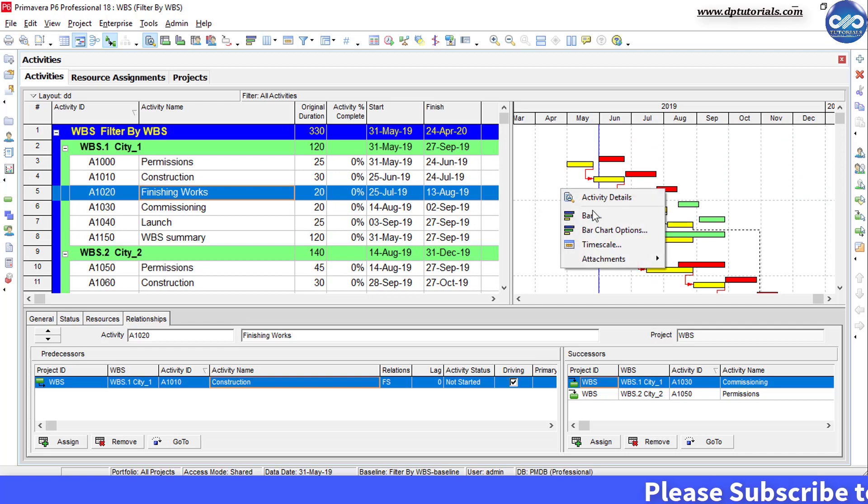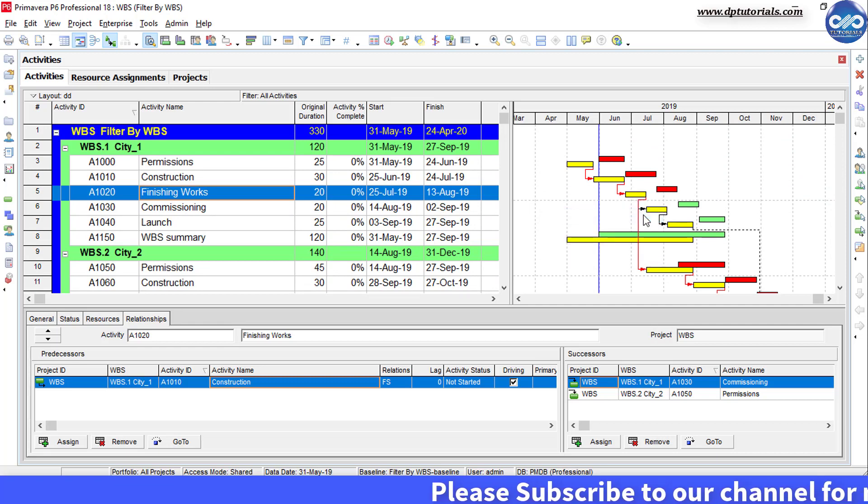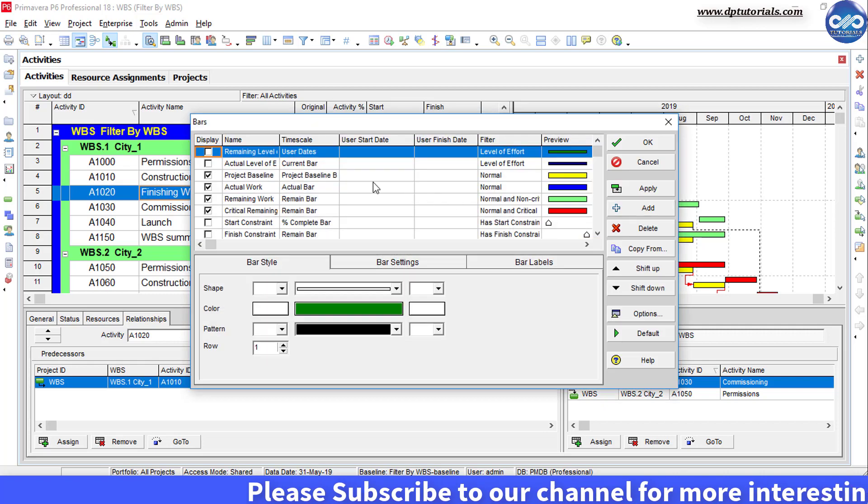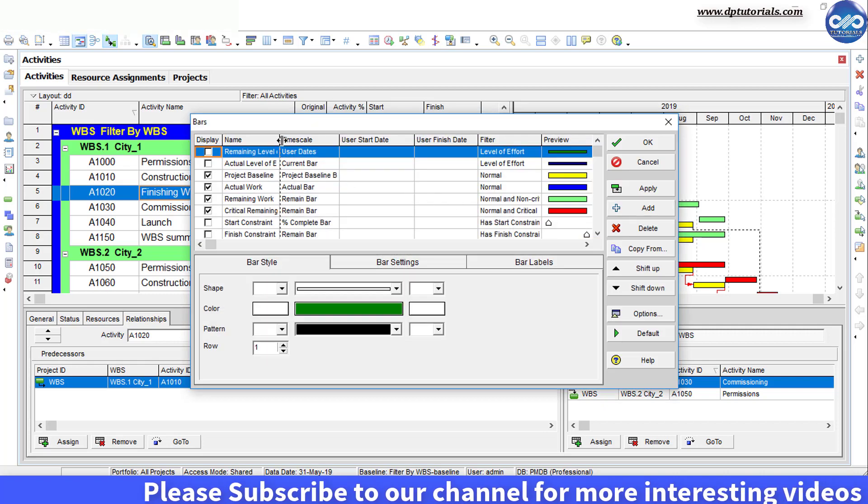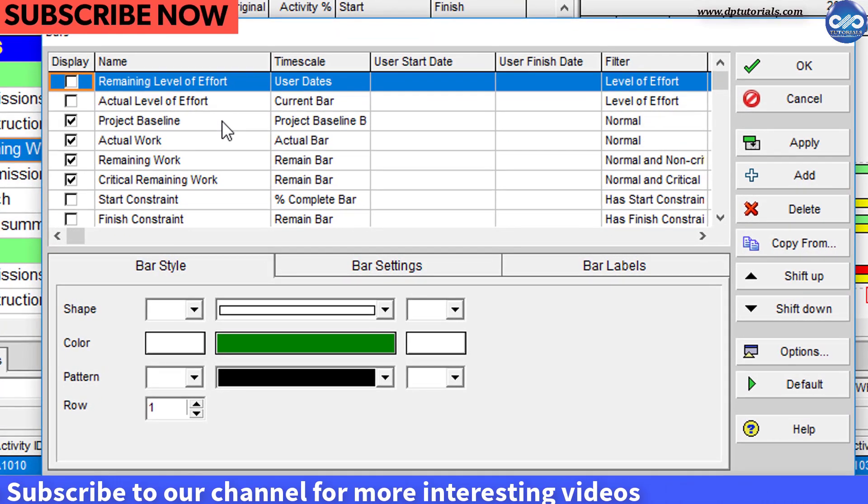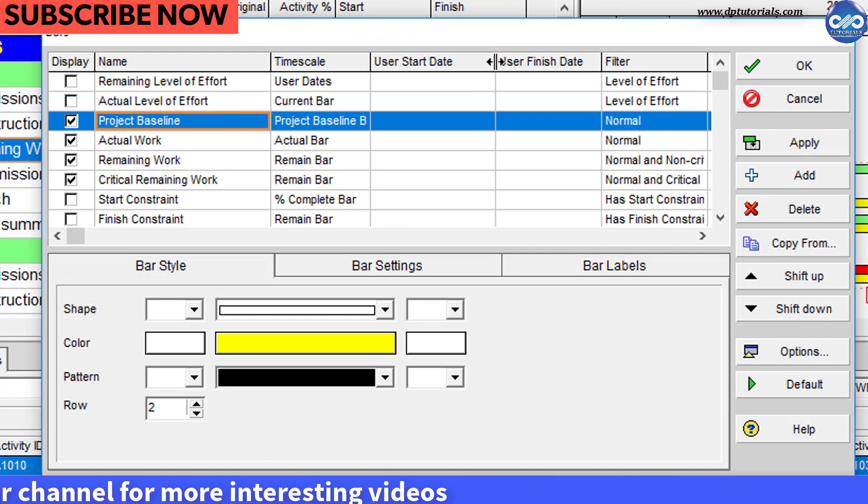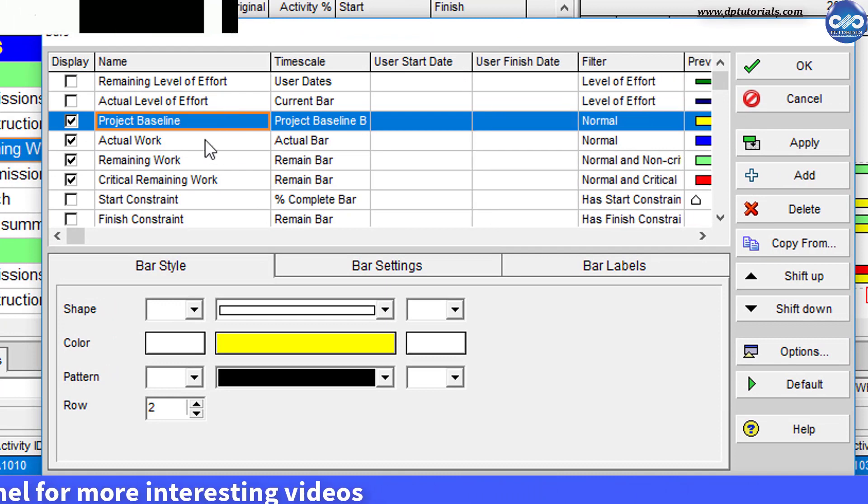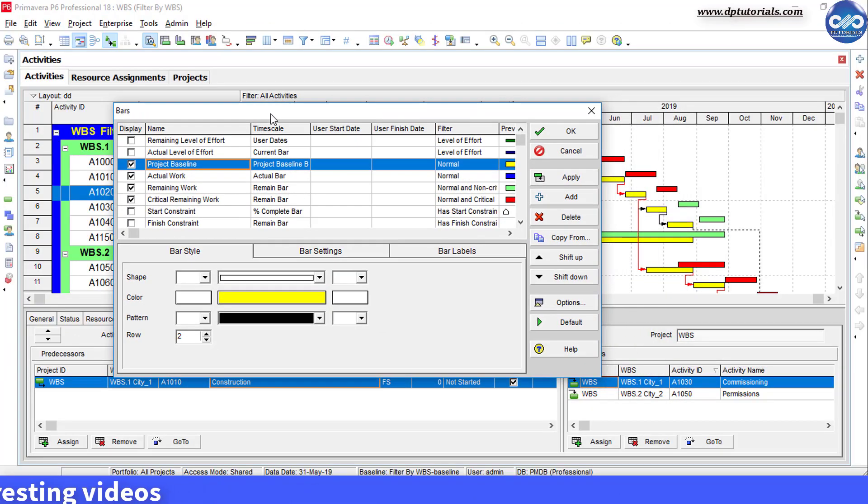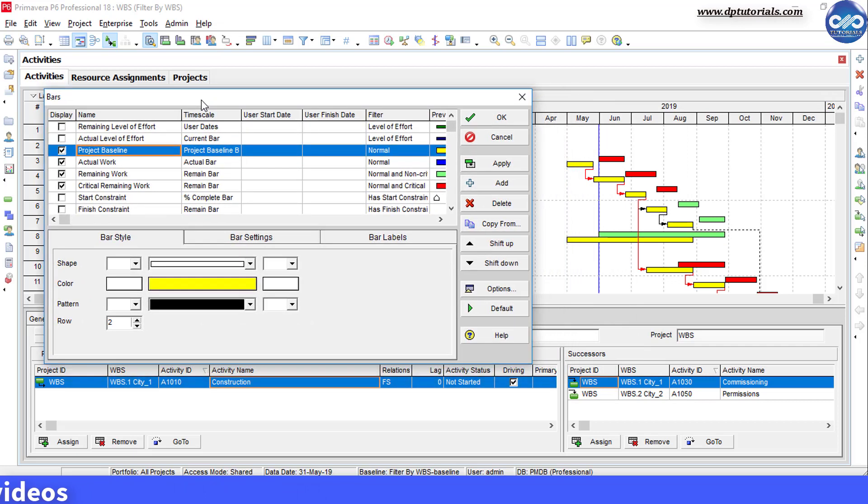Right click on the Gantt chart and click on the bars. You will notice that project baseline bar is in the top order and later I have the actual and the remaining bars. So this is the reason behind this problem.